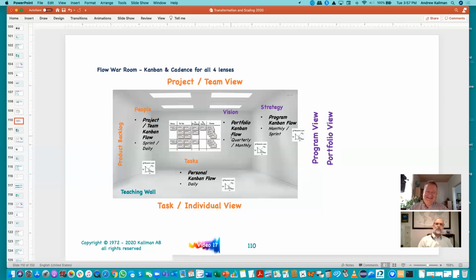But once again, once they understood the dependencies, they knew, okay, I have to get this done by Wednesday so that the next person can take it and get their work done. All my other tasks for the sprint, okay, I can wait till the end. So they managed it.